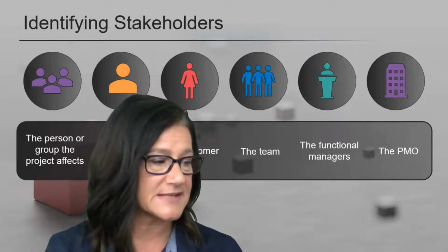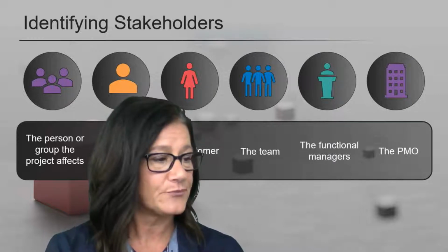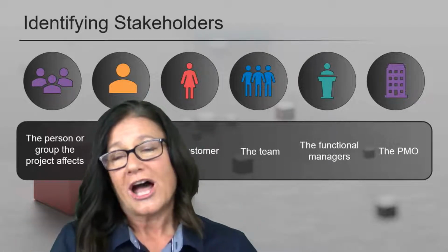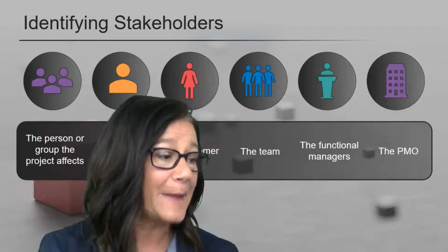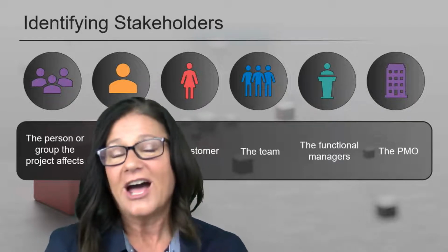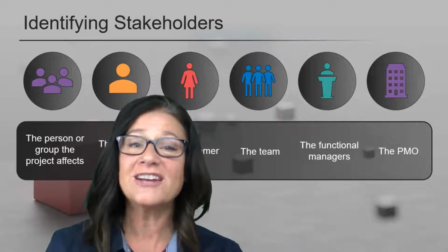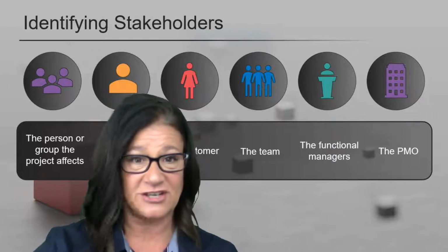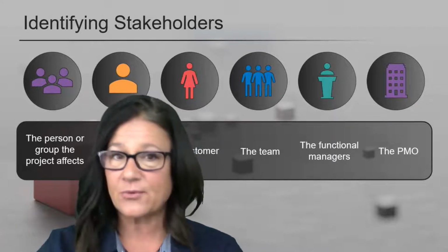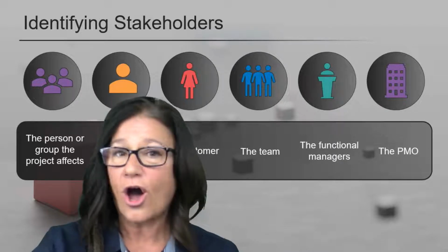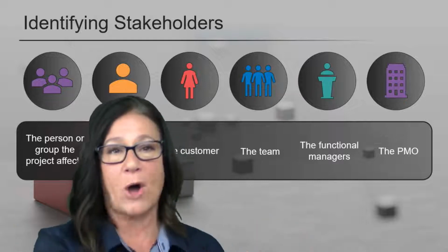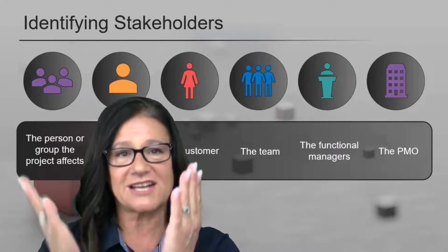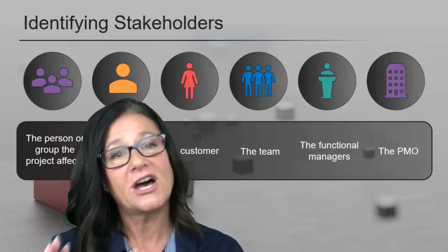All right, so there's some no's and some yeses coming in. Anybody else? This is why I ask, okay? Because this is PMI's perspective. I'm not a stakeholder. I'm an end user, and it's okay, question marks are totally fine. I'm an end user, but I'm not a stakeholder. I was not involved in any requirement collection, direction, or updates throughout the creation of that software. I simply walked into a store and bought it as an end user. Stakeholders have to be part of the project life cycle to be considered a stakeholder.